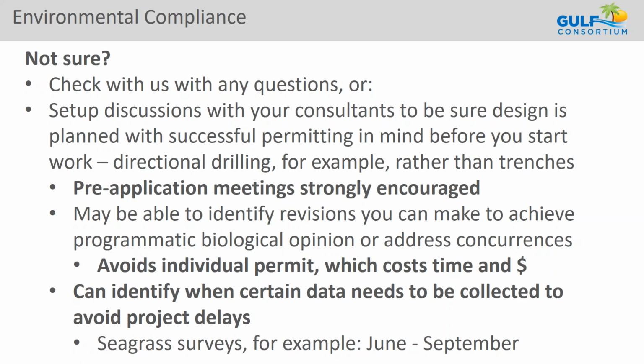Design was done, and there was some type of trenching to put in a pipeline, but because of where it was, they were not going to be able to get the permit needed because of that trenching, and it should have been designed with directional drilling instead. It was a big dollar project, and it was a big deal that got derailed. So their message was to check in with this group as early as we can to make sure design is proceeding in the right way.